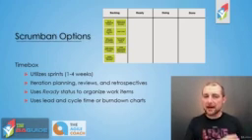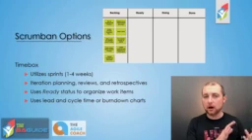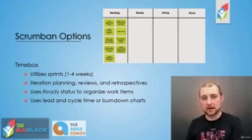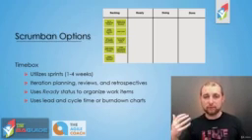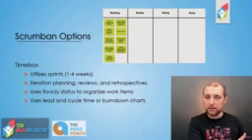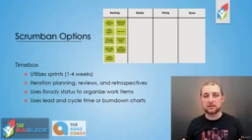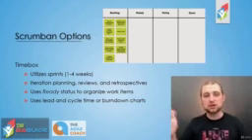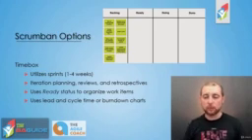And once enough analysis has been done, enough details are on that particular user story or work item, then it gets moved to the ready column. That means, hey, this is ready for work. We have enough details here for a solution to be created or a feature to be created for this particular work item. So items go in the backlog, they get moved to ready once it's deemed that there's enough information, and then it moves through the process like it would in any other Kanban type of framework. You move it from the ready to the doing once you're actually starting to work on it, that work in progress, and then on to the done.